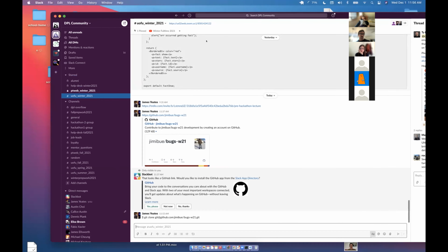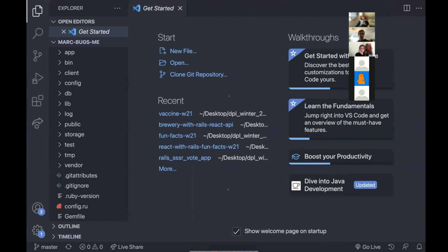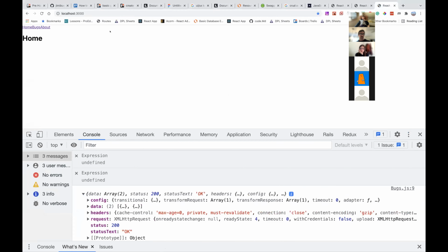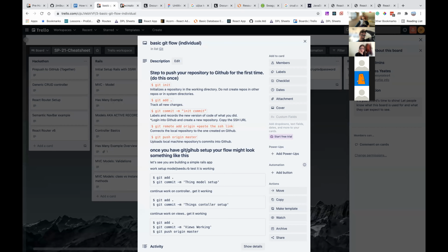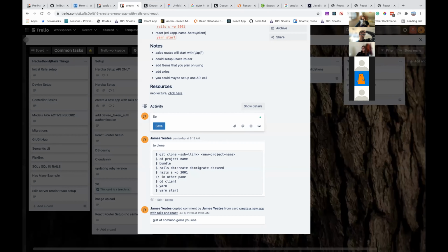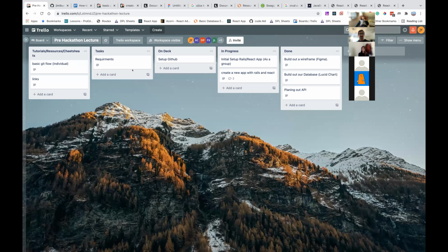So yeah, now I think would be a good time where we could start to break up some work. We could have done this before we started cloning, but this is where we can use Trello. We can start to think about what we need to do. There are a lot of different ways to break this up, but there are some natural places. First of all, there's the front end and back end. And then there are our models, the things we're doing CRUD on.